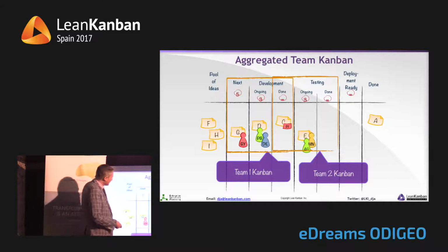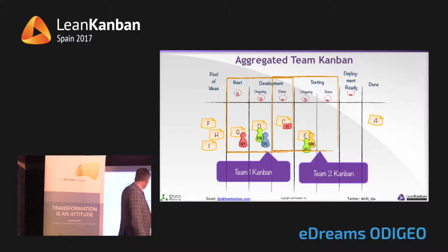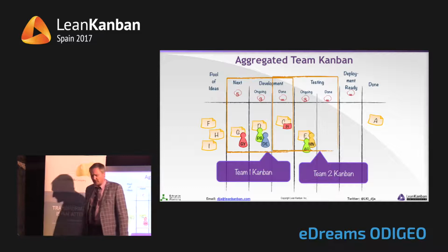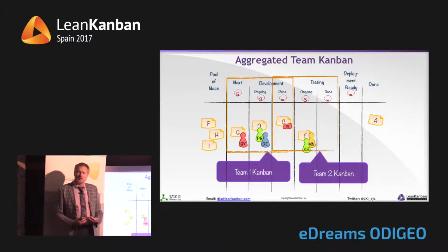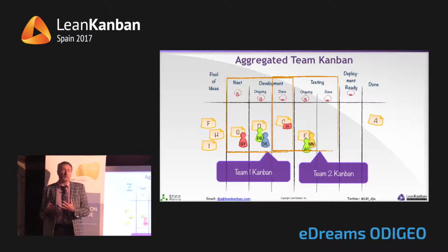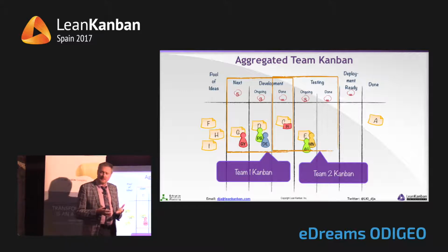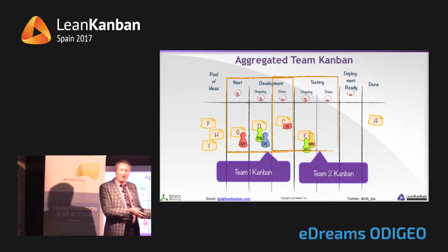Because in order to couple this together, now you have to be able to tell the customer, no, I'm sorry, we can't do everything you're pushing on us. It requires what's known as triage discipline. The ability to say, what are we going to work on now based on our capacity, the WIP limit here? What's going to wait until later, and if so, when? And what are we not going to do at all?